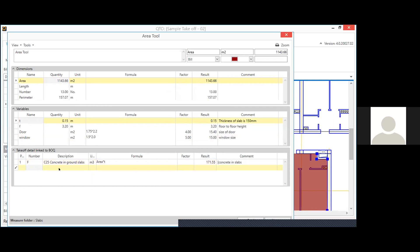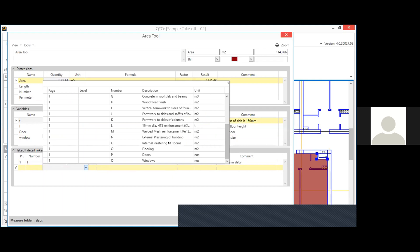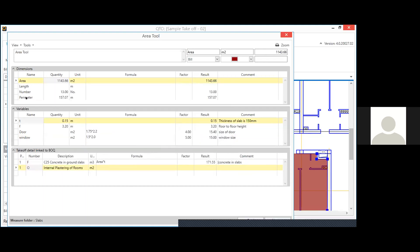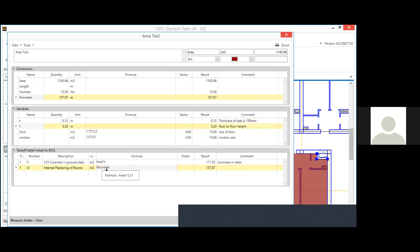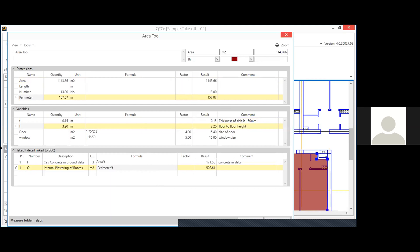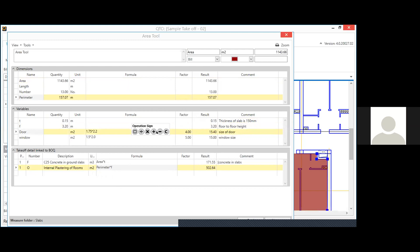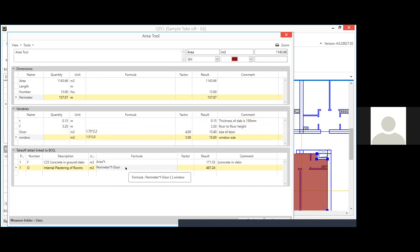For internal plastering, I bring in the perimeter and multiply by the floor-to-floor height to get the total internal surface area. From this, I deduct the door size (area of 4 doors) and window size (area of 5 windows) to get the net internal plastering quantity after deductions.